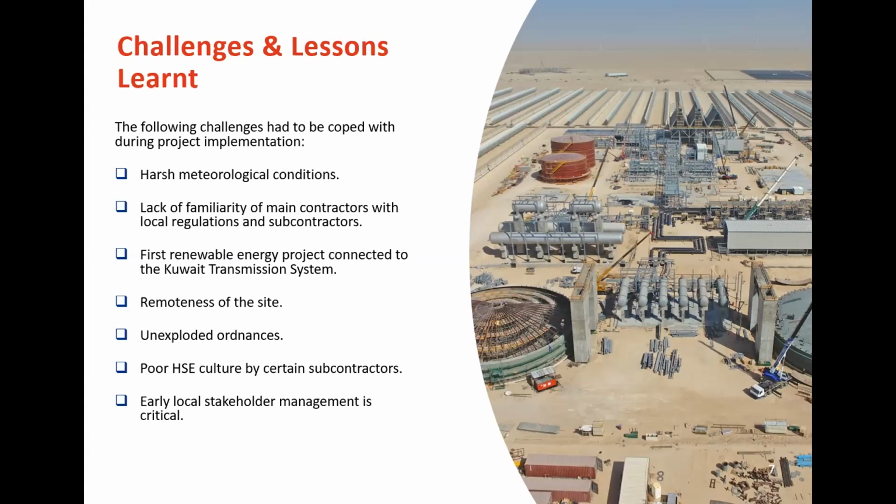Okay. On the remoteness of the site, this was also very important due to a number of things. On one side, having a site which is at a significant distance from the cities made it more complex to secure some supplies, such as water and concrete, and this required additional effort by the contractors to make sure that they would be available.